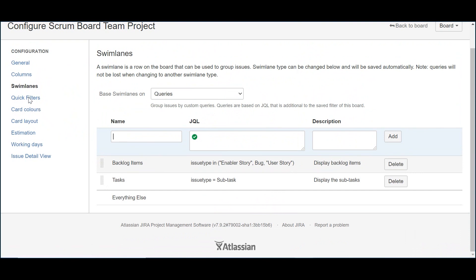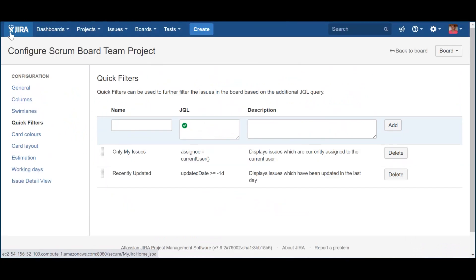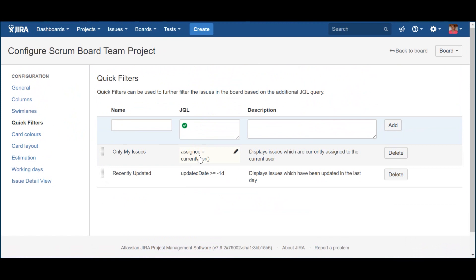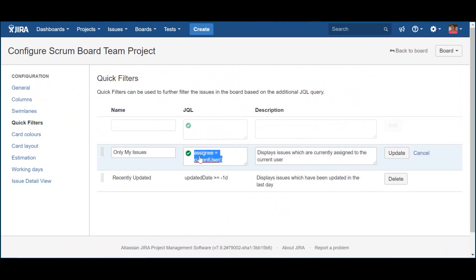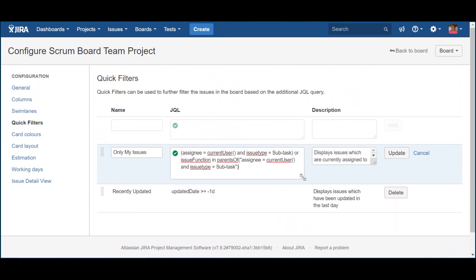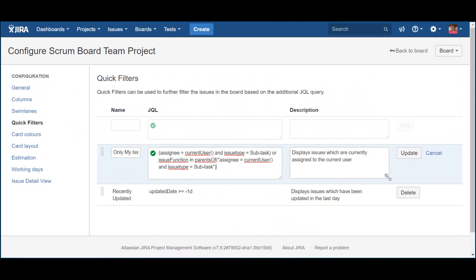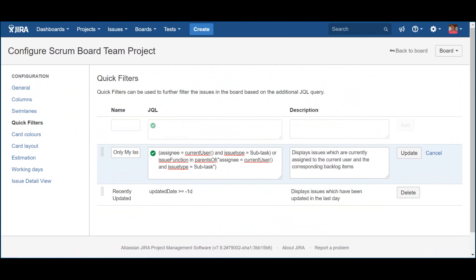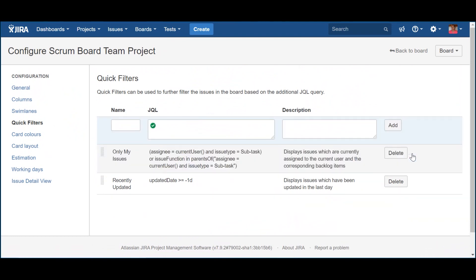Now it's time to set up the filters. This is where I configure the filters that will make the swimlanes a great context tool, automatically adjusted to the needs of the user. In this particular case that I will demonstrate, it's about making the swimlanes a work visualization tool, both for the logged user or any other user that is part of the team. The first thing that I will do is to update one of the queries that comes by default in the board to show exactly what I want. Firstly, this query, myTasks, shows the tasks assigned to the logged user. However, we want to be a bit more specific. I want to see in the lower swimlane just the subtasks assigned to the logged user. Secondly, in the upper swimlane, I want to see all the items where the subtasks belong to. This will allow the logged user to understand to which backlog items he is contributing to.